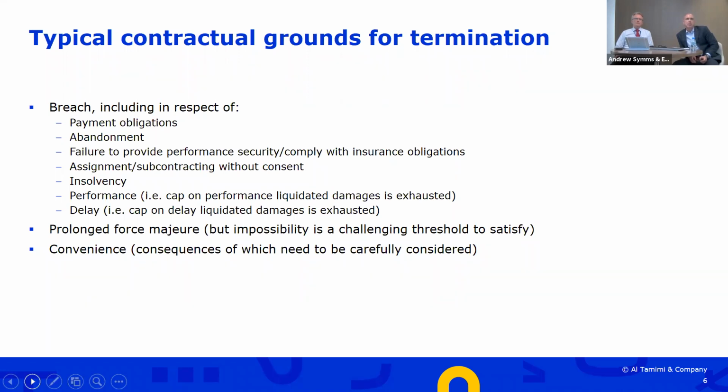So the first is, from a contractor perspective, if you're not being paid, the employer's failing in his fundamental obligation, and so that typically gives rise to an entitlement to terminate. And also, if works aren't being certified, or applications aren't being certified, it can also trigger an entitlement to terminate as well. Conversely, I suppose the contractor's key obligation is actually to undertake and complete the work. So if he abandons a project, then that will typically activate a ground for termination.